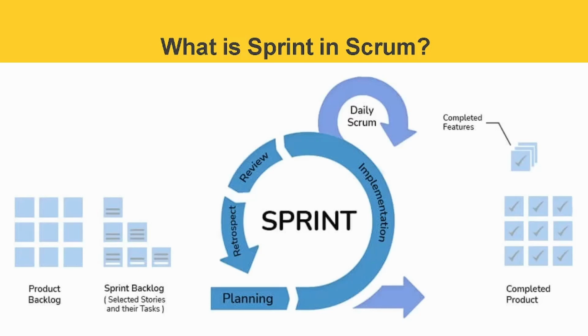After the sprint review and before the following sprint planning, there is a sprint retrospective. The Scrum team will inspect itself and prepare a plan for changes to be implemented during the next sprint during this sprint retrospective meeting.